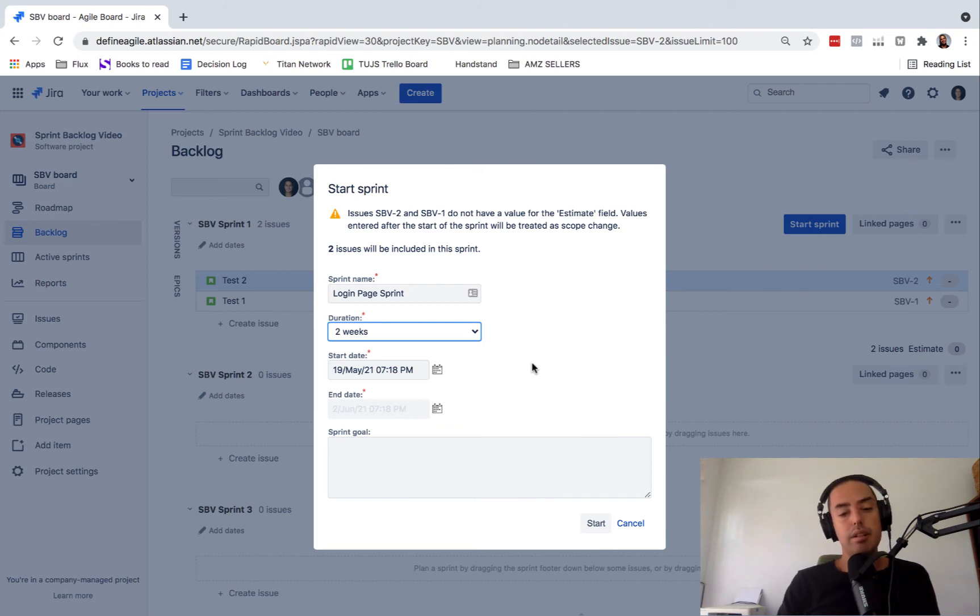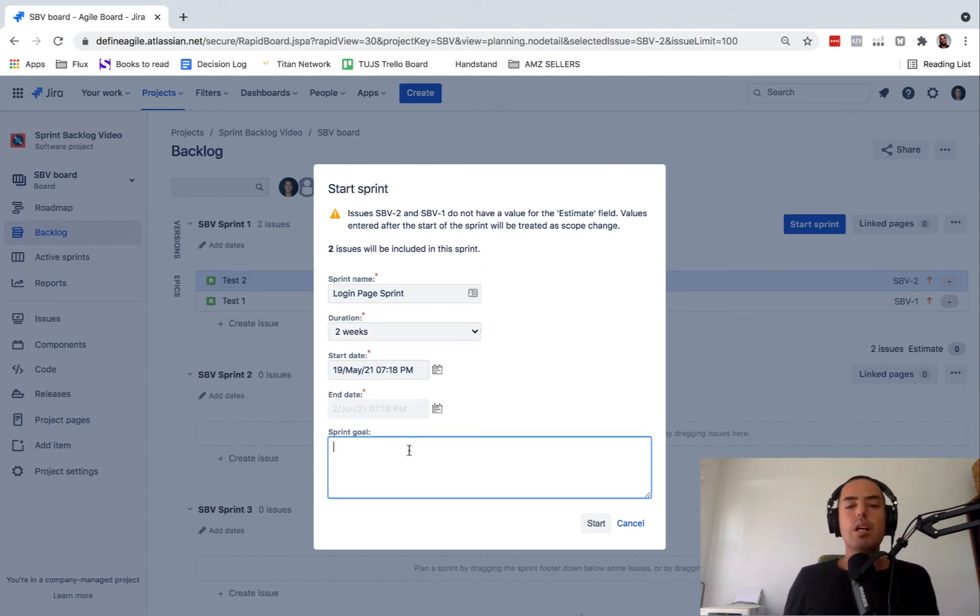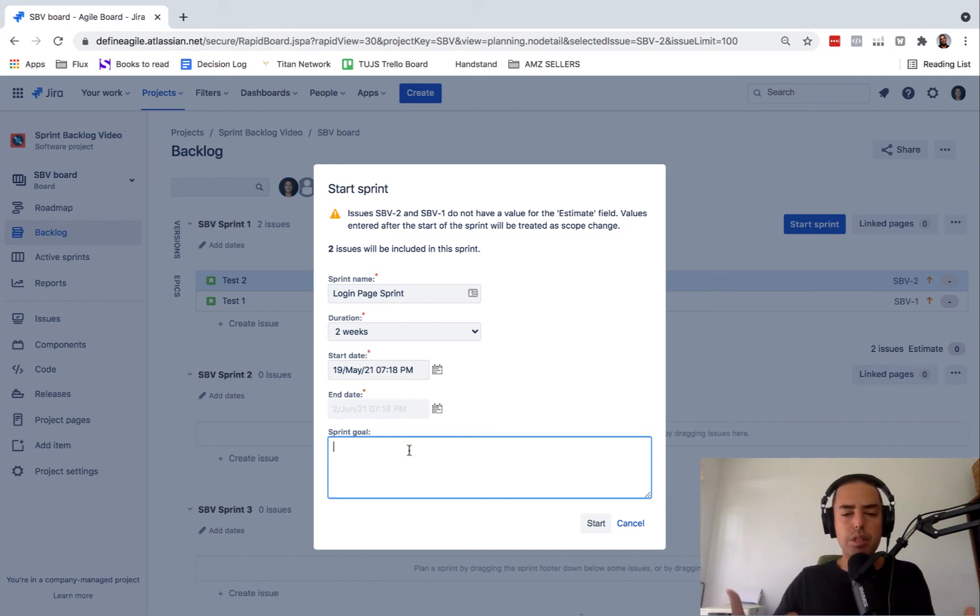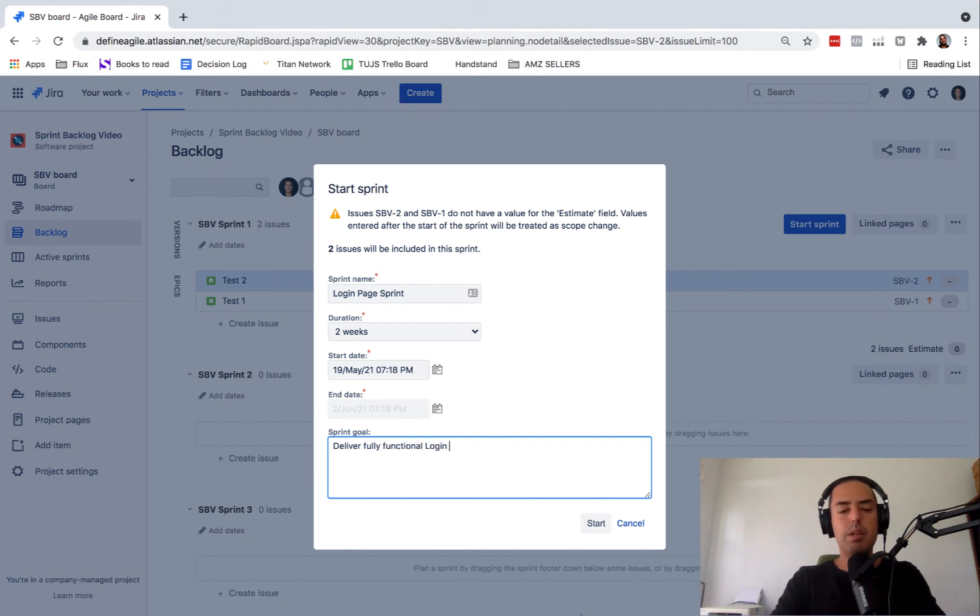And then you can select start date and end date. When you're selecting two weeks, it's already prefilled everything for you. The last thing you need to do is select a sprint goal. What is it you're trying to achieve in this sprint? It needs to be a single goal, because every sprint is bringing some piece of value to your stakeholder. So just one thing. Deliver a fully functional login page could be a goal.